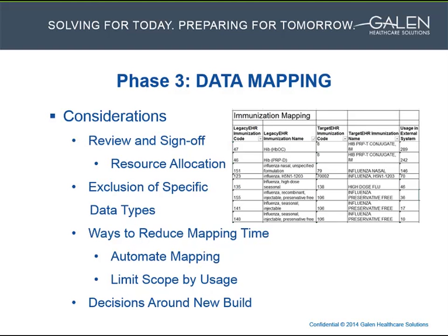Before getting to the mapping stage, it's important that the client assign clinical resources or IT resources familiar with the data to validate and sign off on the mapping. These people tend to have really busy schedules, so the clinical analyst should schedule time to review the mapping with them prior to this phase. The clinical analyst should also be able to provide time estimates on how long the review of the mapping will take them.